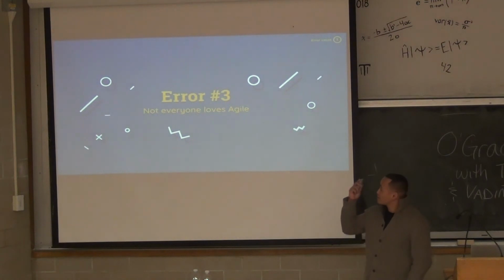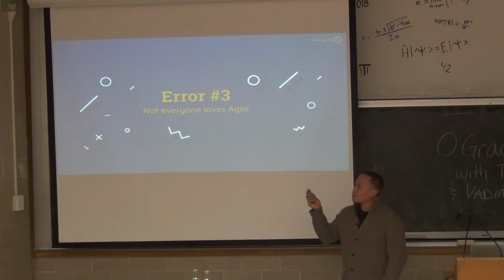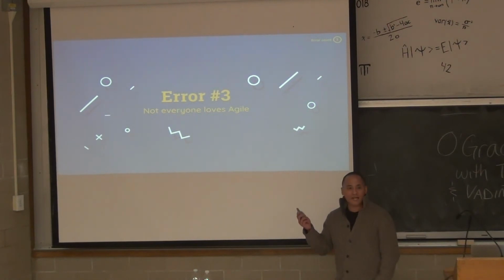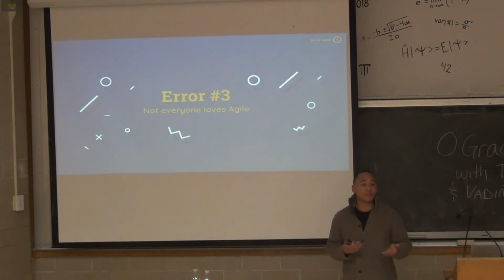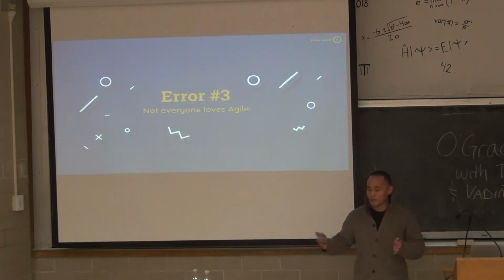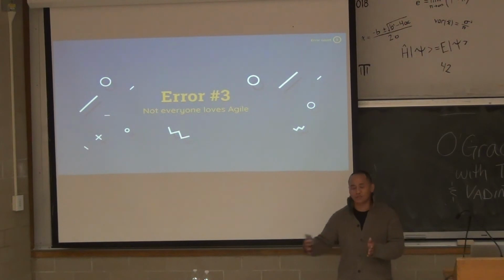So it comes up, this is our third year, not everybody loves Agile. The point we really want to make here is that it's not about Agile, but from a consulting perspective, it's about working with your client on a process that works. You don't really have to do Agile, you don't have to really do waterfall, maybe you could meet in the middle, and I think that's exactly what we did. We planned the project as waterfall, so they built a huge Gantt chart.